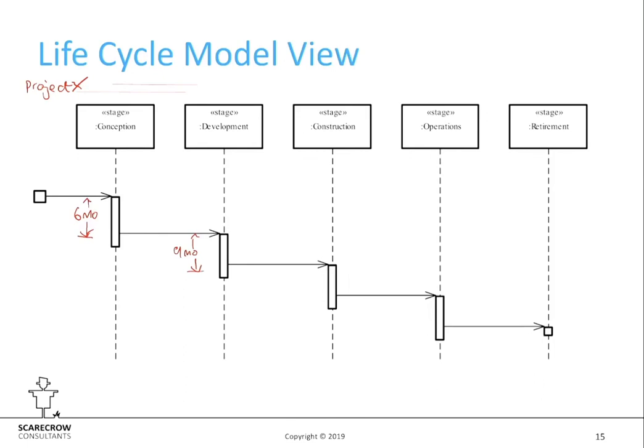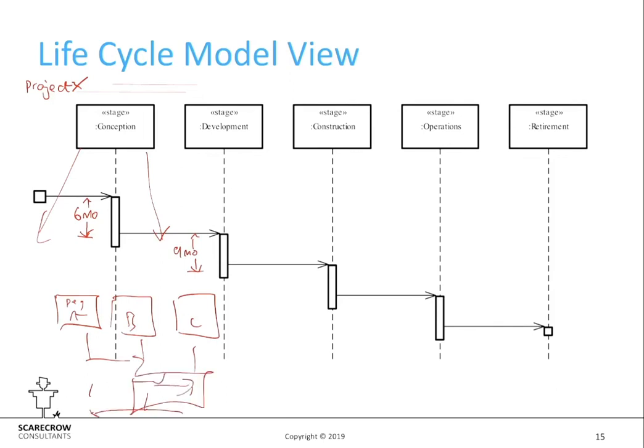What we would actually do when we're modelling it now, because, if you remember, we've got process execution groups associated with each stage. So there might be 3 different process execution groups associated with conception. We would now draw another sequence diagram for each of the stages, and the lifelines wouldn't be stages, they'd be the process execution groups with a name. And we do the same thing. We'd sequence them, and maybe something's going to get looped, and it's going to happen a number of times, and then maybe it's going to come back.